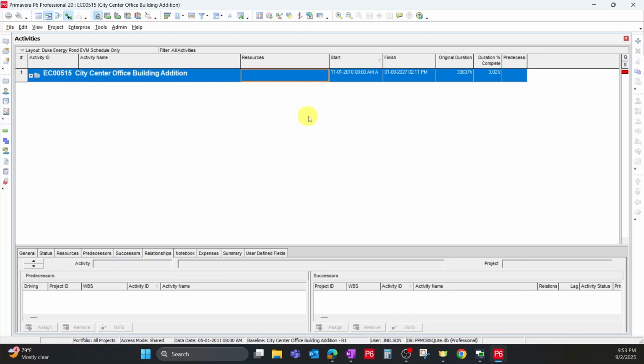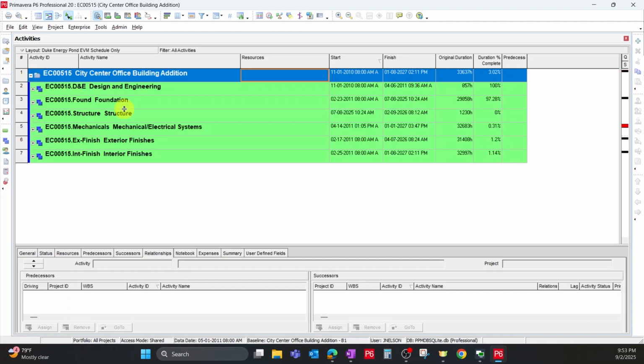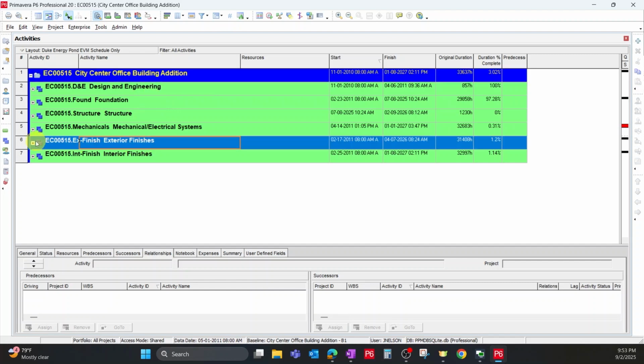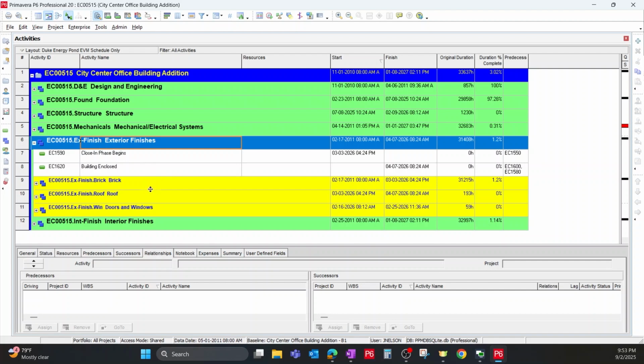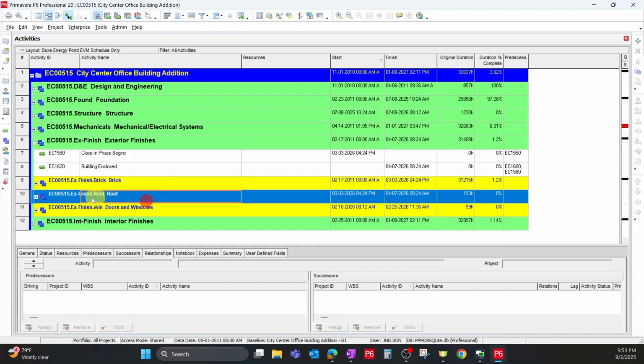So when you add these tasks, you really need to put the tasks in the WBS structure you want. So what you can do is start to open them up. This plus icon shows the structure of the actual project, the WBS, work breakdown structure. So you can see under the main header, there's these subtasks, and then the subtasks may have additional subtasks related with them.